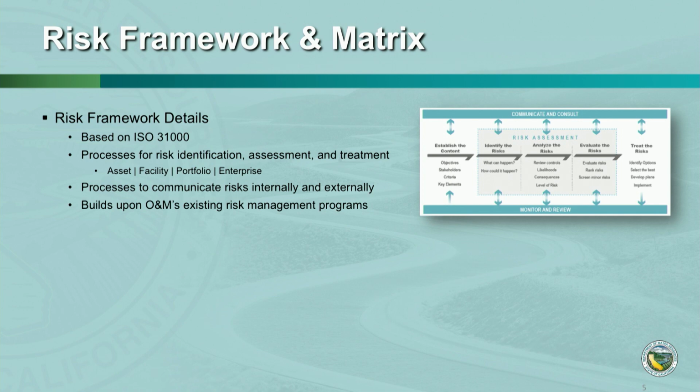And where that becomes important is in the framework, it's not just about doing analyses and analyzing the risks. It's also setting up a framework to communicate those risk results to the appropriate levels internally, where low likelihood, low consequence items are generally held and managed at the program level. As you move into the higher severity, higher likelihood, or higher risk areas, we have approaches to escalate the communication of those risks to division management, executive, and the appropriate external stakeholders.